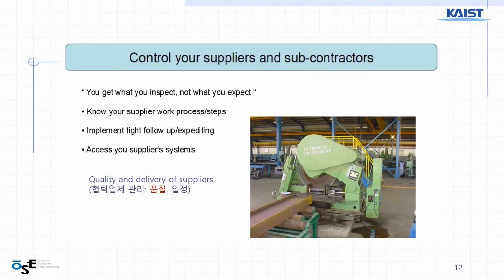Say, imagine that the main engine of a ship is delivered, say, 1 month later than scheduled. Then what happens? You need to wait until the main engine is coming, because the main engine is located in the aftmost part and also the lower place of the ship.